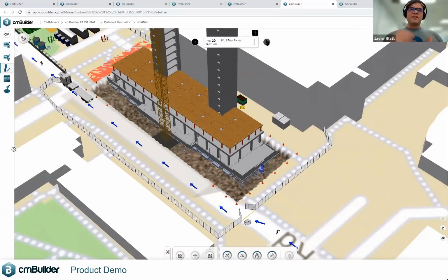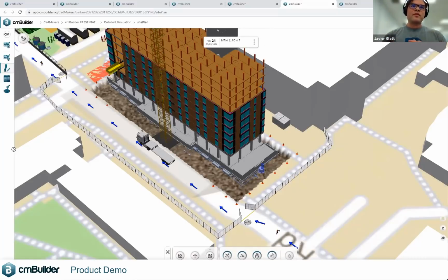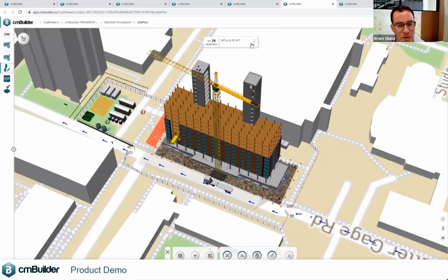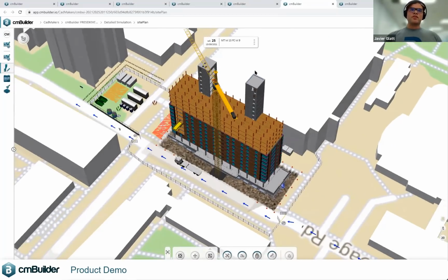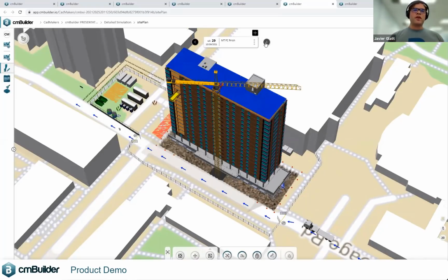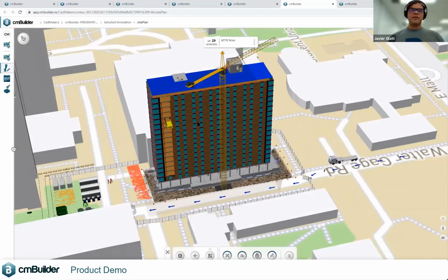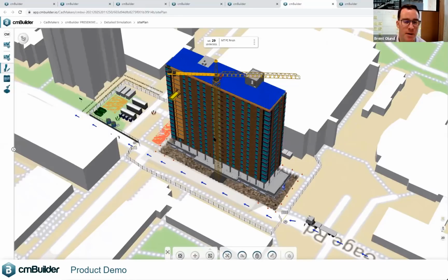So again, this has already been set up for us where you start saying, okay, now it's about 2 floors a week. Correct me if I'm wrong, Brent, was your cycle times? Yep, 2 floors a week. And then those outriggers that were bringing in the materials on, leaving those unitized curtain wall or unitized facade panels out was a strategy from what I understand as well, right? You wanted to bring weight into the building because the mass timber is generally quite light structurally. Was that the idea? Yeah, I mean, we were able to close up obviously the bottom half of the run there by the time we were using the top half, but yeah, we did it that way.